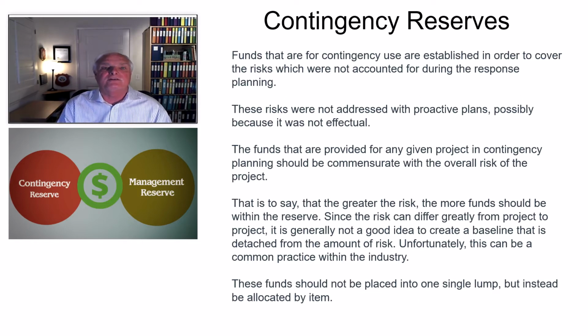Now, there's a couple things that can happen that'll help you. Sometimes things happen that we knew there was a possibility of happening. So you have contingency reserves that are set up off to the side. Now, typically you have to go to a board of some sort, you have to explain what happened, and you have to ask for contingency reserves to be added to your budget. They would offset any of the issues associated with a specific risk.